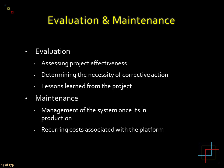Evaluation and maintenance is the longest and most costly part of all IT and IS projects. Often users will realize after using the system for a while that they'd like some other features, or they'll install a new application that doesn't integrate well with your system. So you'll need to patch the system or include periodic updates, and deal with a lot of troubleshooting issues. This is a big job that may need someone completely devoted to it shortly after implementation.